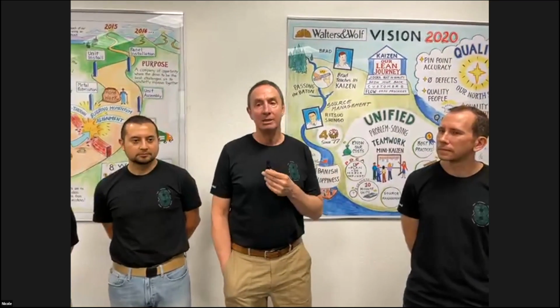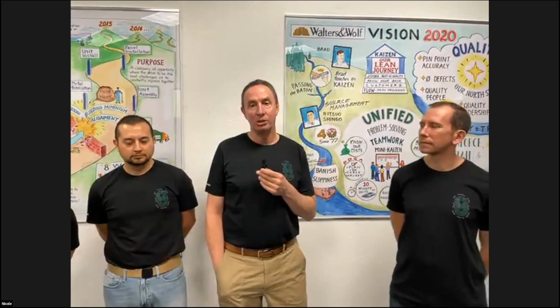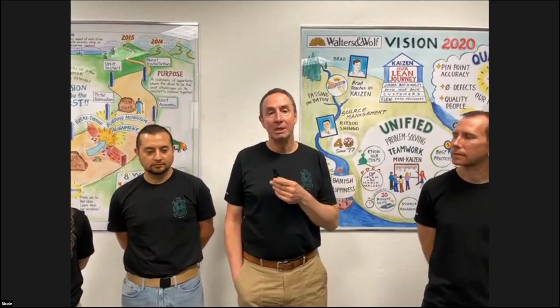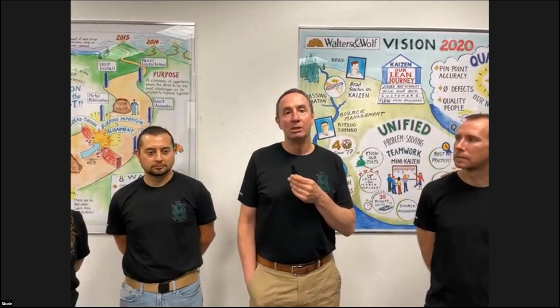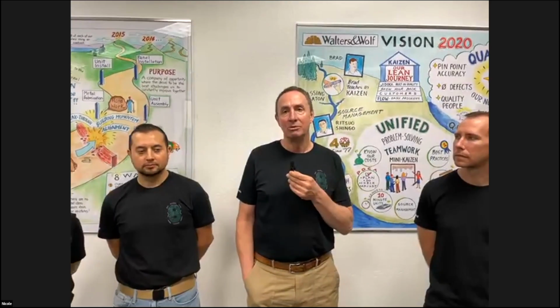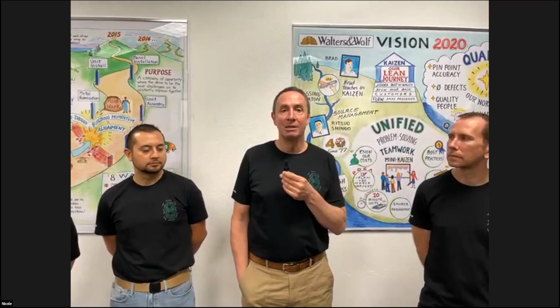Wow. So there, we really focused on the shop. When we got focused on the shop, we realized that most of the waste that's in the shop is being pushed down from all of the predecessor processes. I think that's where the mini Kaizen really started to develop, trying to connect our processes and quit pushing all the waste down our value stream. We used to have stacks and stacks of inventory in the yard of completed units, just so that the field wouldn't run out of units as their installation was going on. Today, it's down to, in some cases, almost the same takt, but we still aren't quite matched between shop production and field installation. Those guys in the field, I bet they get it done amazingly fast.